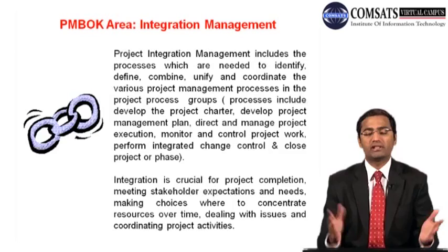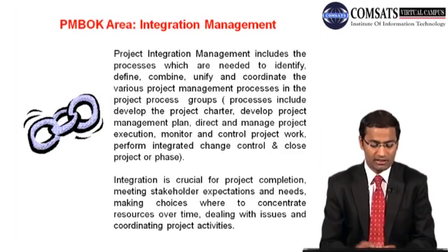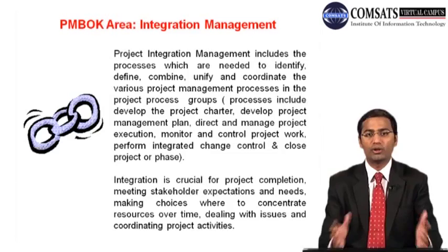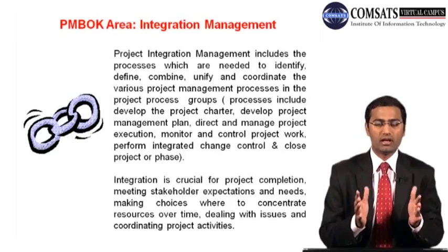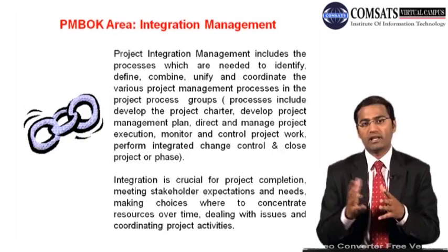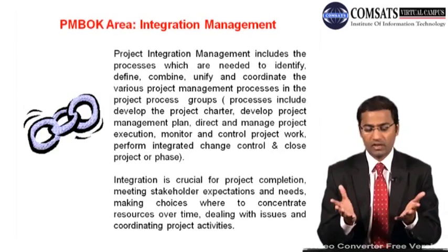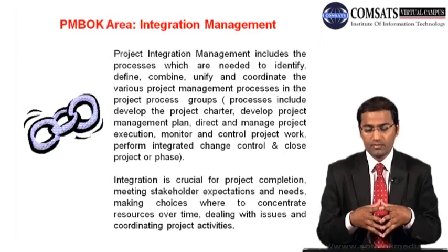I'm leaving, no, this is not the case in the real world. Then you have to carry out necessary audits, financial closure, procurement closure. So it is not like that; you have to perform financial closure and procurement closure, you have to actually archive all the data, you have to gain formal acceptance of the customer, so you have to close the project.